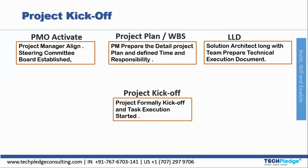Next we go to project kickoff. There are four different phases under project kickoff. The first is Project Management Organization Activation — the project manager is aligned as the main person responsible for everything, a steering committee is assigned, and the board is established.